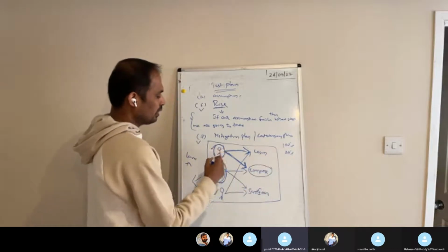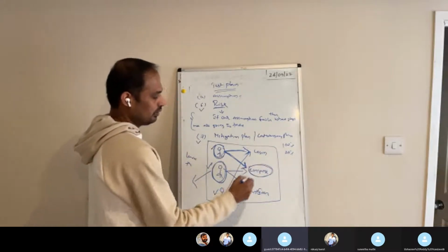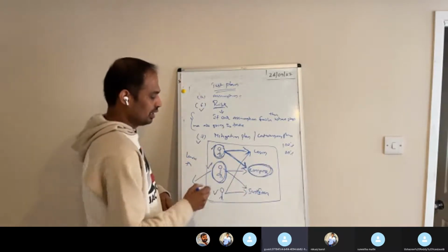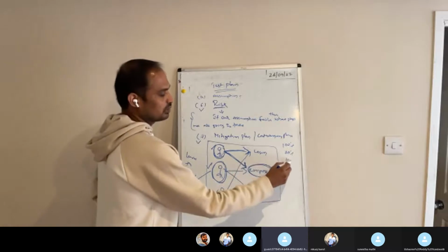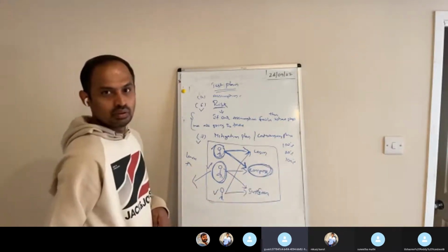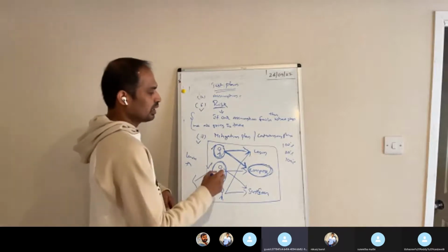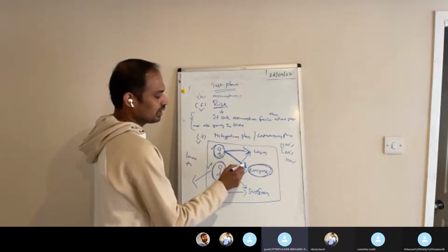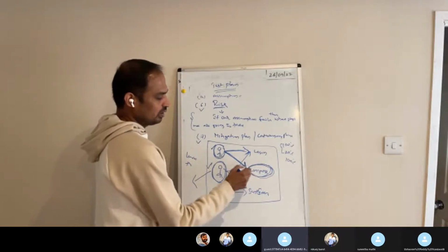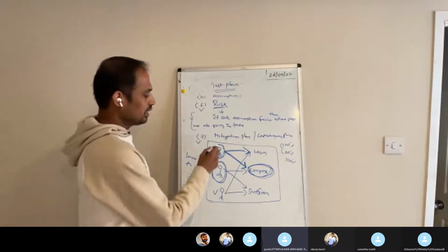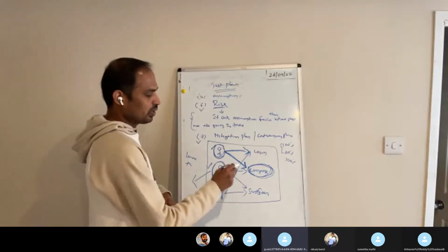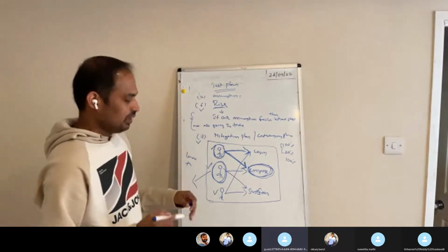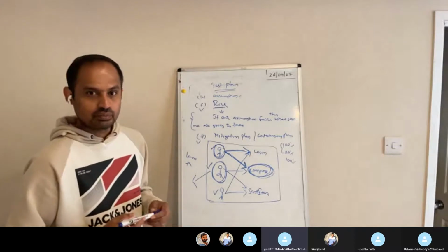If the other two resources have no knowledge of compose mail, we'll have a risk of 100%. That's why we reduce the risk by involving the other testers in one of the features. Each resource will have knowledge of one or more features. This way we'll have a mitigation plan.